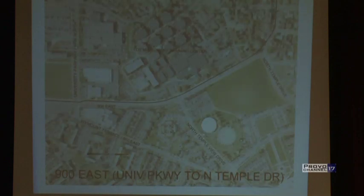We will cross around the MTC. The contractor actually has penalties if the MTC entrance is not open on Wednesdays. So we are basically going to be accommodating that.